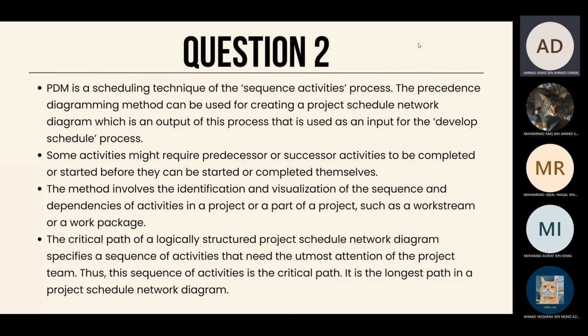Okay, so this question is regarding PDM. PDM is a scheduling technique of the sequence activity process. The precedence diagramming method, or PDM, can be used for creating a project schedule network diagram, which is an output of this process that is used as an input for the develop schedule process.